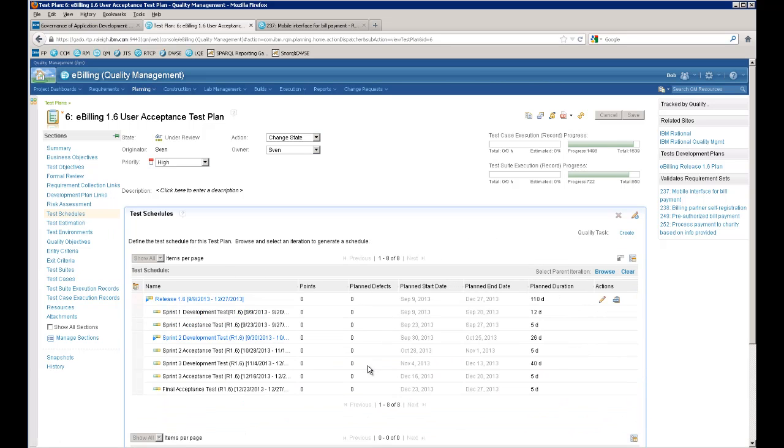From a scheduling perspective, JKE has scheduled 2 acceptance test iterations per development iteration, one performed by the supplier or development team who wants to ensure the tests are successful, and one done by the JKE acceptance test team. Now, these can be scheduled independently, so the supplier might do their testing first, or they could overlap. But by testing at the end of each iteration and tracking the earlier result of the supplier acceptance testing, JKE gets an earlier indication of whether everything is on track.